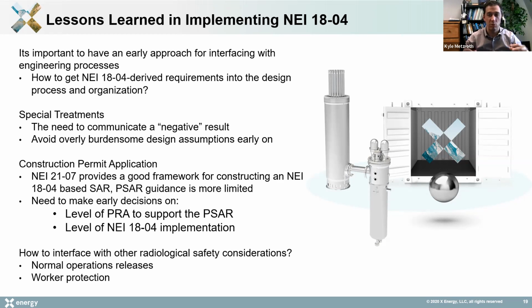But people took the absence of something and said, well, you haven't told me yet, so I'm going to be conservative. And then people went and applied a whole bunch of things that, when we said, hold on a second, don't do that. With NSRST, I think the philosophy is that we're trying to go with industrial best practice and add on some stuff, not start at full-on nuclear treatment and walk back. So there's an element of how you communicate that and set a mindset about NSRST in order to get the right outcome, because you can end up with overly burdensome design assumptions early on that you may have to walk back from.